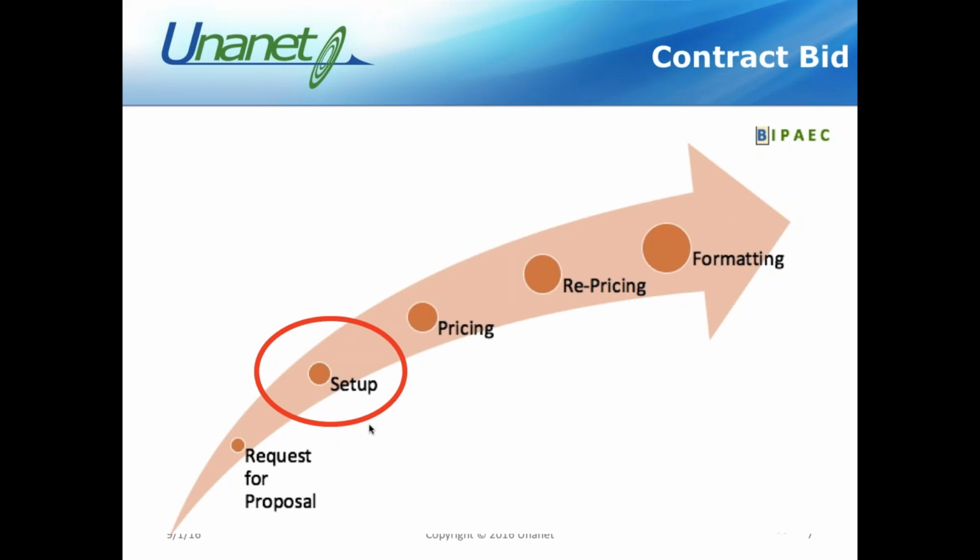Now, typically, you're going to go back to your engineers, your technicians, project management, and they're going to look at the pricing there and say, well, maybe we can do some repricing. Maybe we can cut some corners here. Instead of doing project management for 10 hours a period, maybe we can do it in 8 hours a period. Or maybe our technicians can do a little less prep on the training and modify that to be 6 hours versus 16 hours or something.